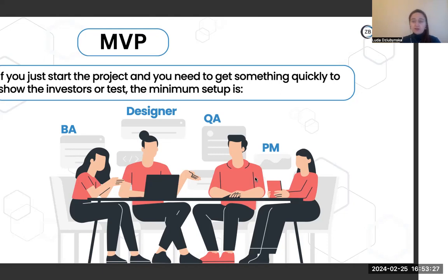Again, in most cases for an MVP the designer is not needed full time. After the design is created, maybe 40 to 80 hours of time, depending on how big the MVP is. But an MVP usually, for us at least, takes one to two months, and for one to two months, 40 hours is usually more than enough. Again, there are some cases, but let's take a more general example. And after that, the designer is either not connected at all, or connected when some change request comes.